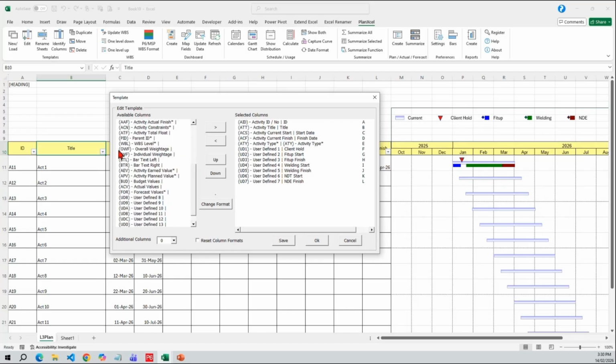For all the WBS level or level wise weight factors you want to use, you have to use the IWF, because OWF will always talk about the calculation of the overall levels. You can use the IWF if you are satisfied with going ahead level wise, where for each level this is 100. Okay.